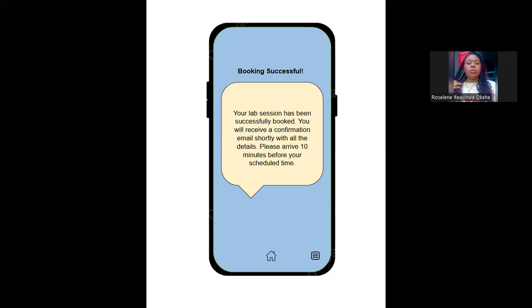One of the areas that needs improvement is how tasks were estimated and planned at the beginning of the project. The issue we had was that during Sprint 2, we found that our estimates for developing the Choose Lab screen and Book Now screen were not detailed enough. We had to break the tasks into smaller subtasks, such as designing the drop-down of the lab options, coding the booking confirmation button, and testing the form validation. As a result, these tasks took longer than expected.